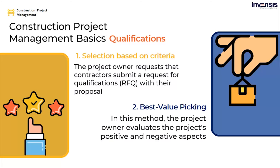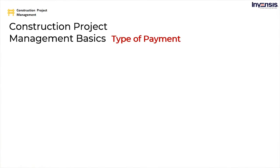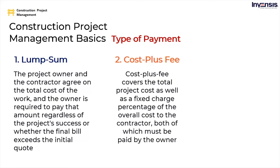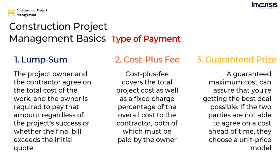After an owner has chosen a contractor, the next step is to arrange a payment agreement. Four common payment options exist: a lump sum contract, where the owner and contractor agree on a total cost regardless of outcome; cost plus fee, covering total project cost plus a fixed fee percentage paid to the contractor; guaranteed maximum price; and a unit price model, where the owner pays a set unit price for each phase if parties cannot agree on a cost ahead of time.